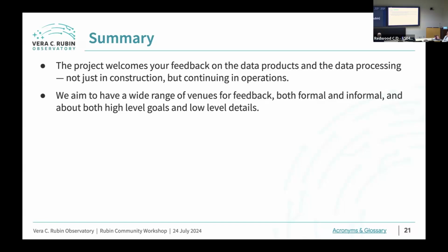Maybe you want to give a comment on that. Yeah, without putting any numbers on it or making any firm statements or commitments, for the earlier data releases, which are a smaller data volume, there may be a little bit more slack in the system to be able to iterate at some level. Because you provision things on 5-year timescales, and that imagines that eventually the data is going to grow to be as big as it is at the end of that.